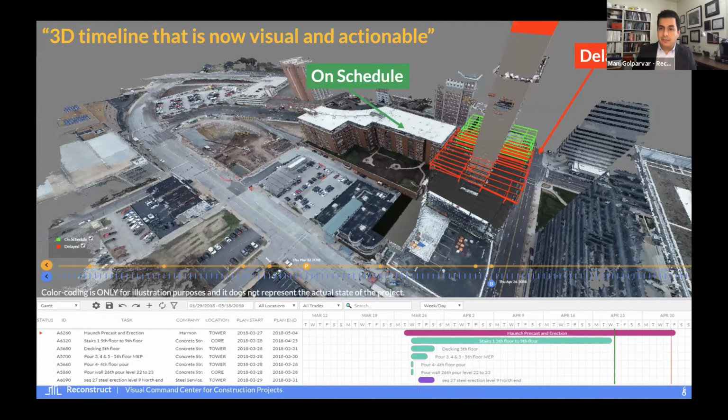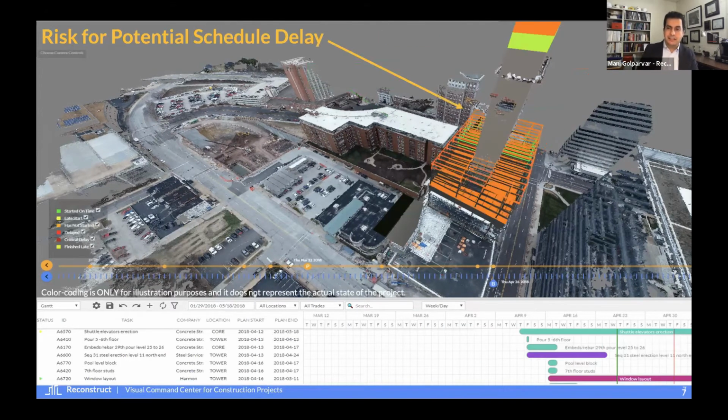As Phil mentioned, our platform also has an AI engine, and what it does is track rates of production and productivity on the job site, and it can forecast locations that are at risk for delay. So when you go to your coordination meeting with your trade contractors, you can rally the team on that location that is at risk for delay. So instead of being retroactive to delays that have happened in the past, now you can plan how to revise a plan in the future.